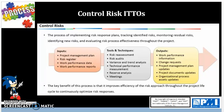Risk audits examine and document the effectiveness of the risk response. This is similar to the quality audits done in perform quality assurance, which we'll cover in the next set of videos. Basically, an audit is where you get a third party to audit the process of how we are responding to risk and how effective we are in doing that.